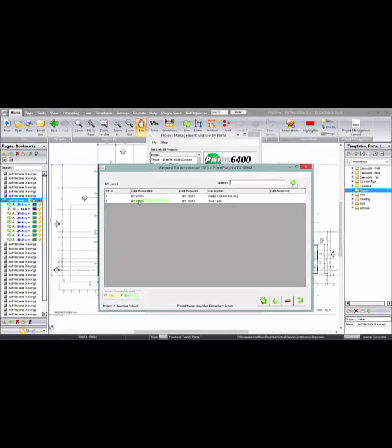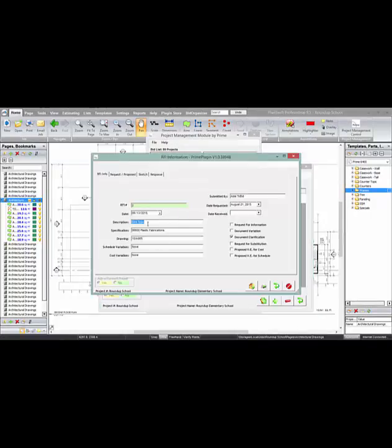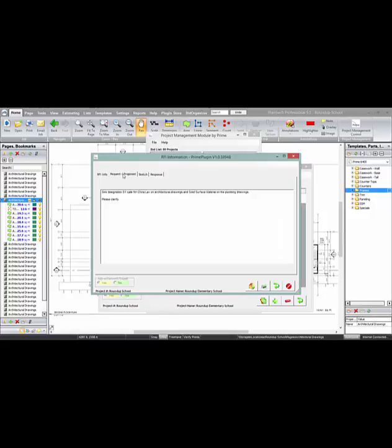We'll open an existing one and show you that in this case we're looking for a sink type clarification. We complete all the appropriate information that you see here, and then we can request what we're looking for. The sink designation is contradictory on the drawings, and we're looking for clarification as to what that might be. Again, these RFIs could be used post-bid or pre-bid in order to get this information for you and track the